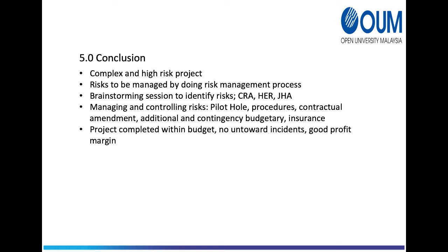Due to potential of shallow gas present, one of the controls that has been taken was by conducting a pilot hole drilling. Pilot hole drilling is mainly to investigate the absence or presence of the shallow gas at proposed soil boring location.